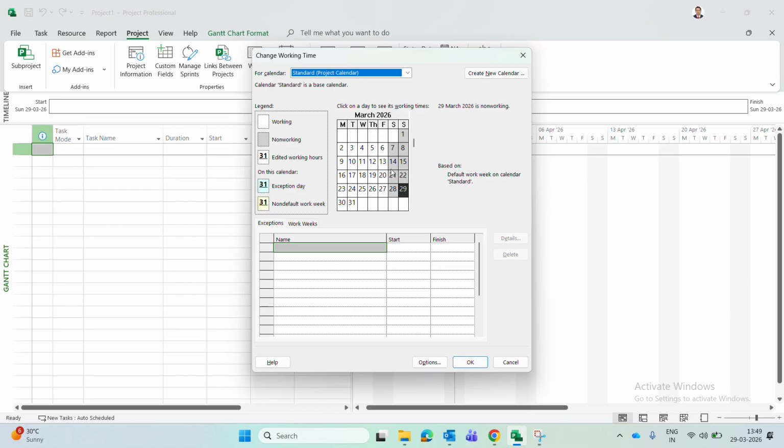Sunday also we will be working, but Sunday we will not show as a working day, because from practical experience, I am telling you that you have to keep Sunday as non-working in your schedule, because there will be some delays. Everything will not go as per plan. Those delays need some days to recover. So Sunday is an option to recover all these delays of your week. That is the reason we'll keep Sunday as a non-working day and Saturday as a working day.